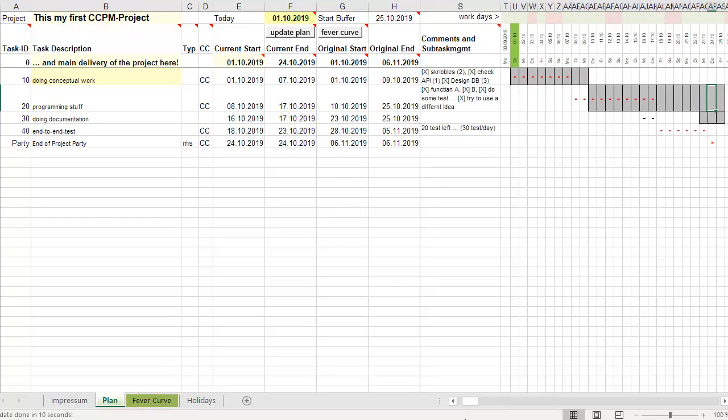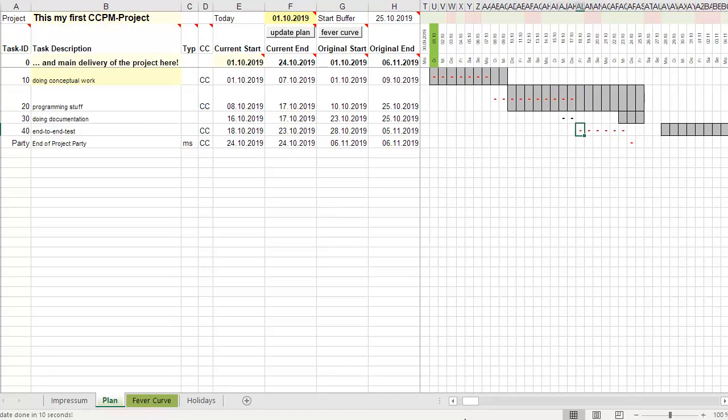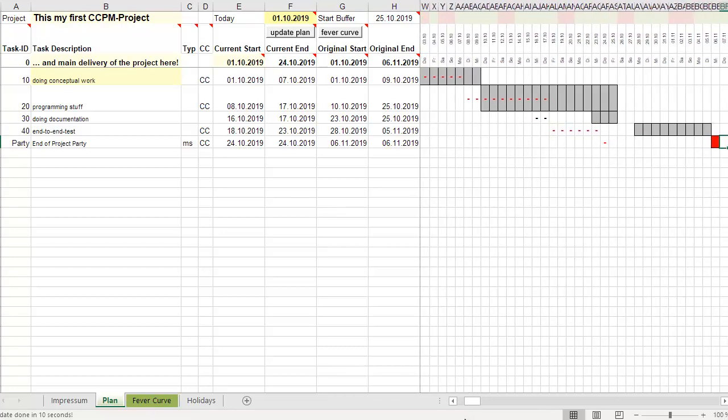The duration of 12 is cut down to 8: one, two, three, four, five, six, seven, eight. You see here the feeding chain without an offset, because you have to do it manually. And here the next work package, the end-to-end party. Everything between this milestone and this dot is a buffer. That is all to take care about. Nothing is changed at the due date, it's still the same. But you have one-third of the project critical chain as buffer.